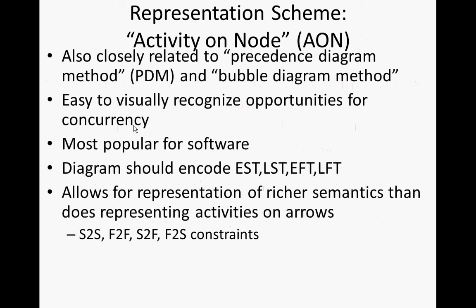We're going to use a technique that's called activity on node representation, okay? And without going into all the details, it turns out this is related to a technique known as precedence diagram method, which is one variant of CPM, or bubble diagram method. This is the most popular one in software, so if you use Project or any number of other packages out there, this is the most common one.